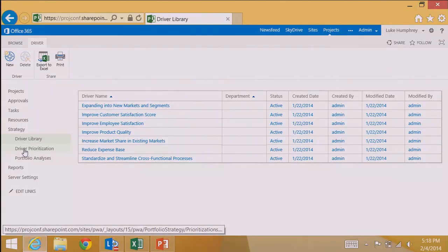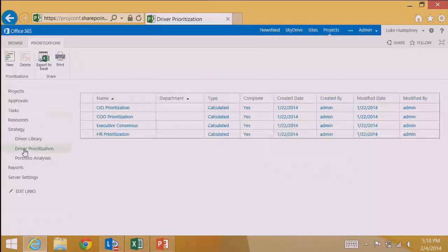So yeah, you want to have 5 to 7, mainly so you can differentiate value between the investments. Once you have the drivers defined, not all drivers are going to be created equally. Each driver is not going to be as important as each other driver. So you want to figure out what is the relative driver prioritization.